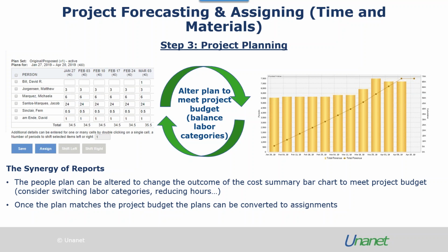But personally, at this point, we tend not to put this in place just because it's R&D and plans can change quickly. But as the budget gets tighter, we can actually implement this control so the resources cannot exceed their allocated hours. So the next slide.